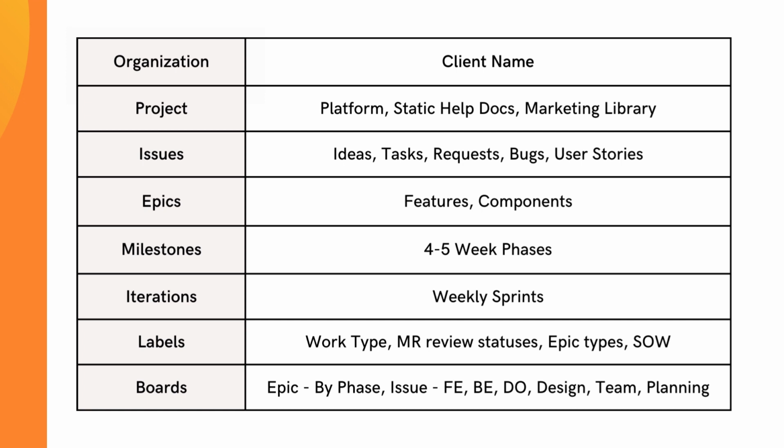And then at the end of each phase, it's kind of like, okay, bam, we've delivered a good chunk of work. So I might pull out about three to four, usually about 3 big epics per phase. And then through each iteration, or weekly, we're iterating or building up on those different epics that we've outlined for the phase.